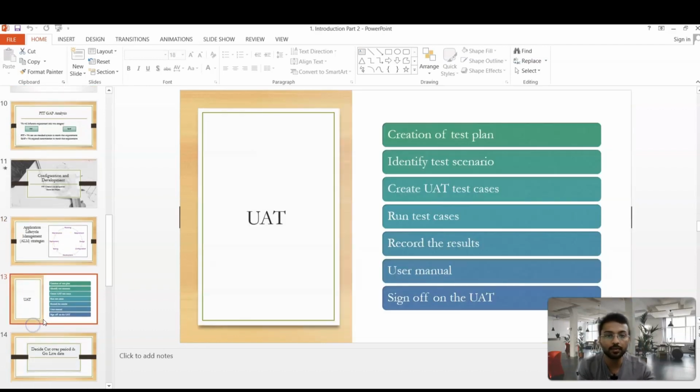After that, the next step is UAT. Sometimes UAT is on-site and sometimes it is virtual. The functional consultant prepares the UAT plan. In the UAT plan, they identify all the test scenarios they will perform during the UAT. They conduct UAT with users and showcase the standard and customized processes of D365, what they will perform while passing the entry of the transaction.